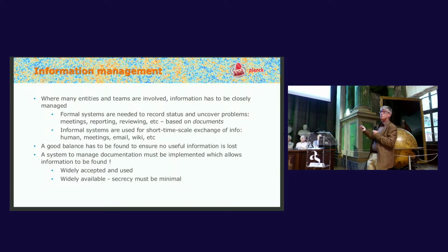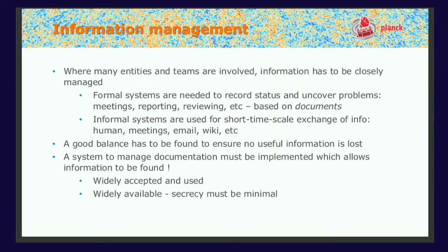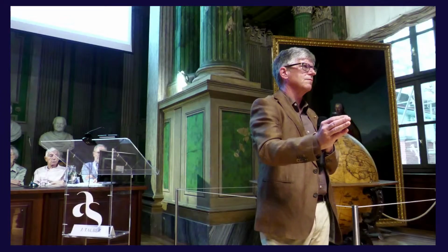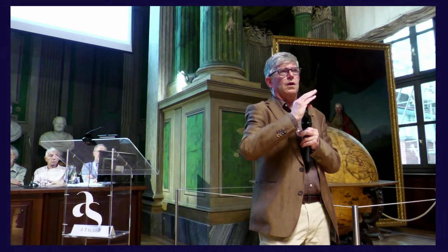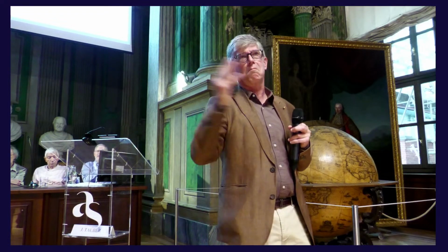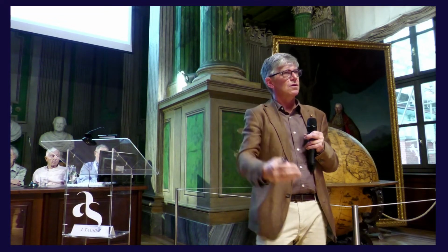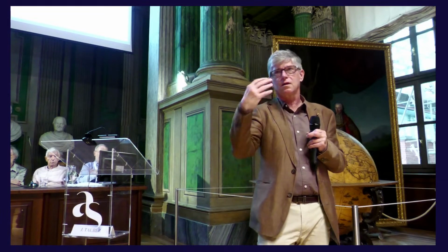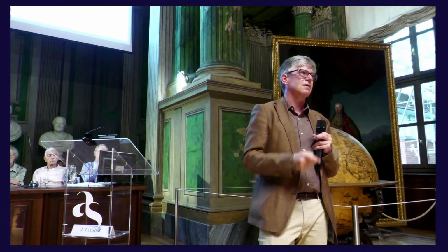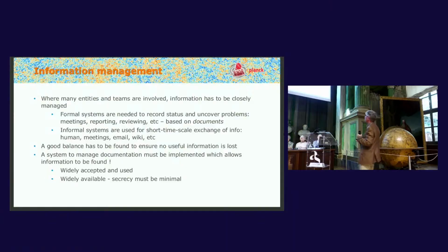You need to manage documentation. At the end of Herschel Planck, we had tens of thousands of documents, and I'm only talking about the ESA part of the system, not the science part. And they all went into a system, and they disappeared instantly. You could not find them. You put something there, and then finding it back needs somebody recording metadata and doing things properly, and not just dropping something in there. That's just not enough. It really needs work, okay?